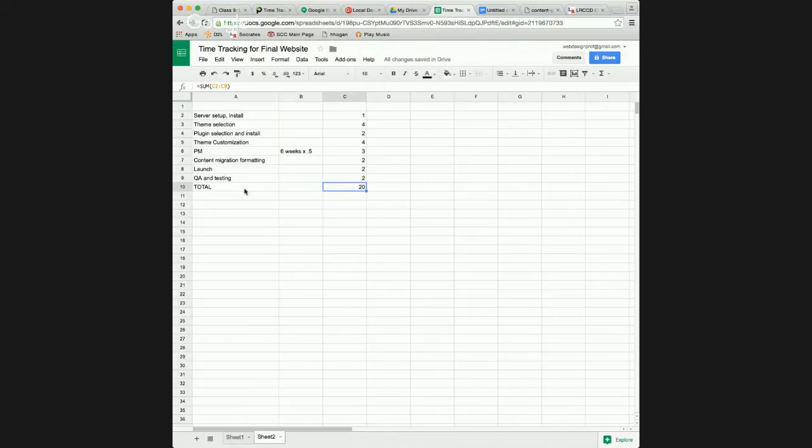Here's where it gets tricky, if you're proposing and they know that they only have budget for 15 hours. So here's what I do. I write down everything we're gonna do. If I have a team, I do different columns for different team members and what they're gonna do and how many hours they're gonna get for each task. And then I'll write our hourly rate. And then I will do the hourly rate times the hours, get the total, and see if that's something I can sell.